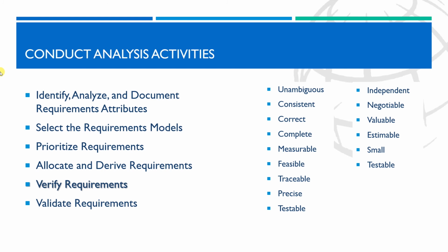The conduct analysis activities. Requirements analysis is more than analyzing information to further understand it, complete it, and improve it. It involves structuring requirements in different views to capture varying perspectives, evaluating requirements for certain attributes, and integrating the collective information into written documentation. Requirements analysis is a continuous process, and the first step is identify, analyze, and document requirements attributes.